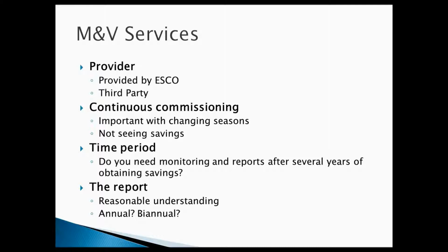There are 4 steps listed here, and looking at the key risks is an important factor. Bigger parts of the project with higher projected savings are often going to have more potential risk. But we also need to consider the technology that's involved. A system that has to be adjusted by hand may be easily misconfigured, where other components are less susceptible to problems. So we need to keep an eye on focusing our M&V dollars in the places that are likely to be most effective.